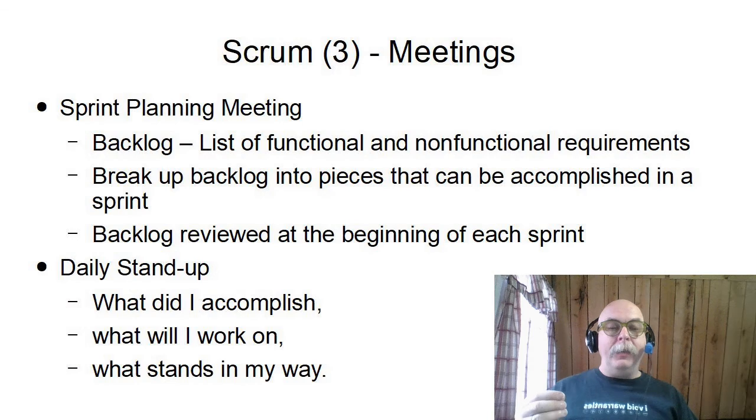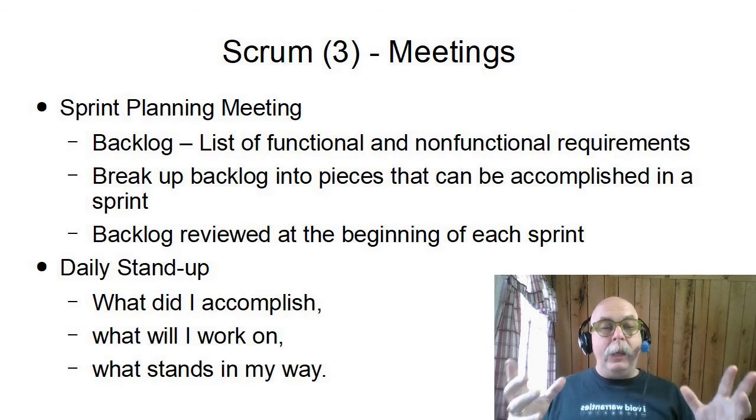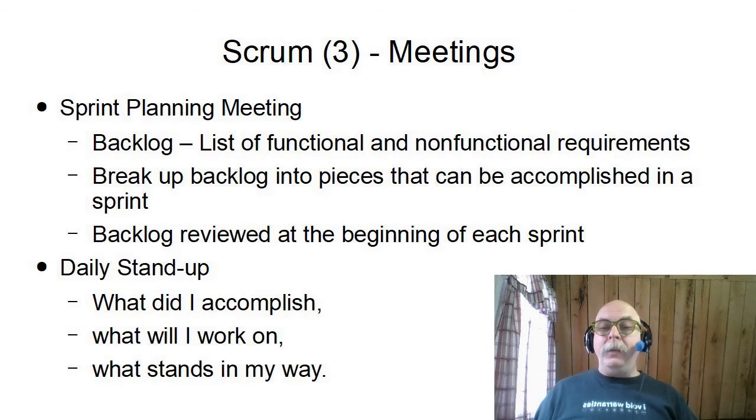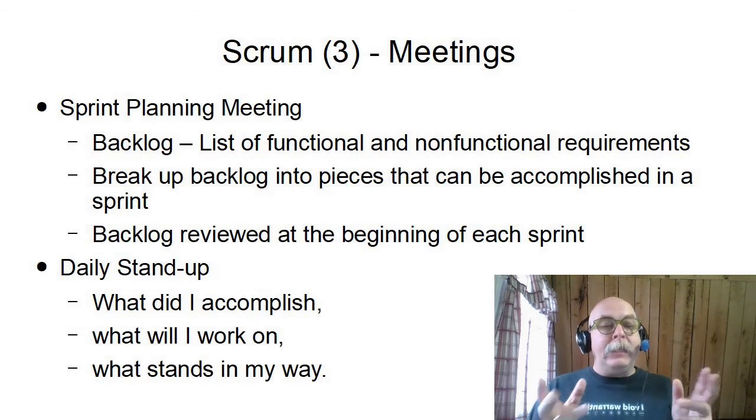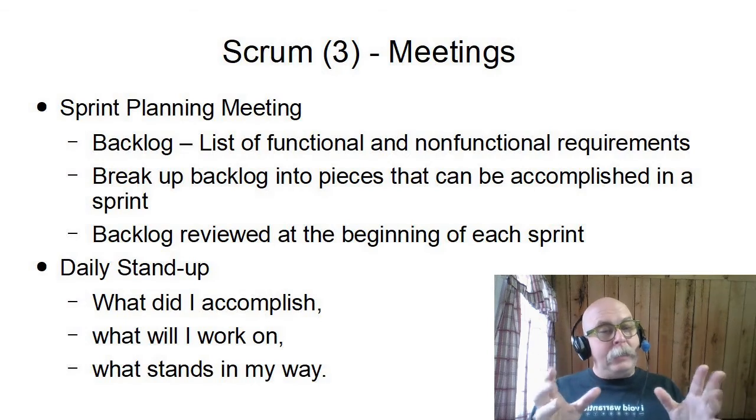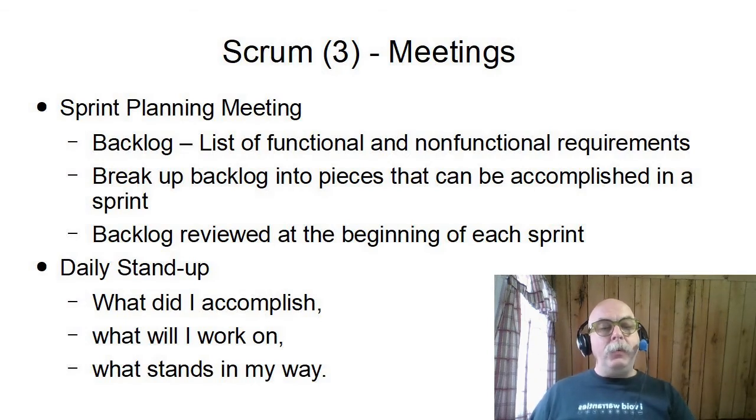Every day, there's a 10 to 15-minute meeting, usually. They're very short, often virtual online, or everybody is sitting around in a meeting room. And you basically go around the room and everybody says, what did you accomplish yesterday? Well, I got this and this and this done. Okay. What are you going to work on today? Well, I'm going to work on this and this today. And then you discuss any impediments that are in your way.